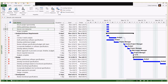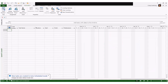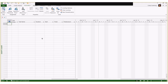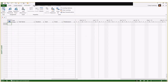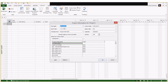Let's go into Microsoft Project and take a look at exactly how you can do that. I'll open a blank schedule. Going up to the Project ribbon, you can see an icon called Project Information — that's where you set the project start date. You have the option of scheduling from the project start date or the project finish date. Schedule from the project start date; don't do it from the project finish date.